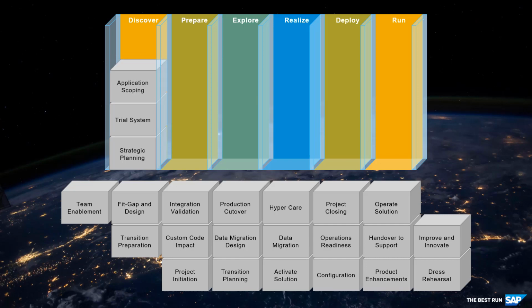In the third activity, called Application Value and Scoping, a decision on the implementation scenario and a comprehensive implementation strategy for SAP S/4HANA should be created, which can be achieved by a Value and Implementation Strategy service. In the case of system conversion, the conversion readiness of the existing SAP ERP system should be checked as well with the SAP Readiness Check. The outcome of these steps can be leveraged within a company to build a business case for an SAP S/4HANA implementation project.